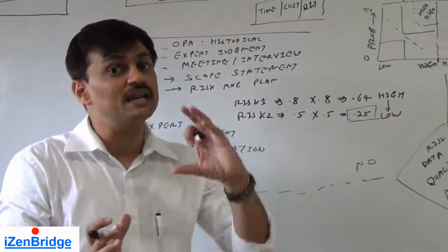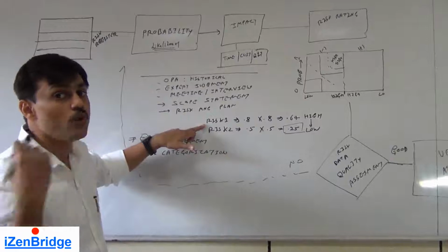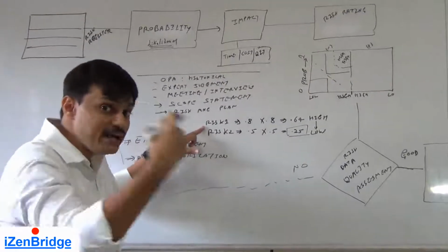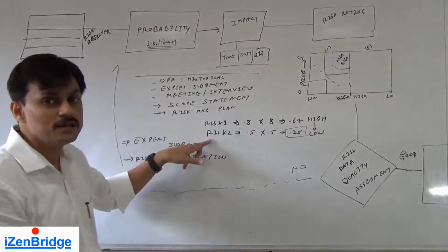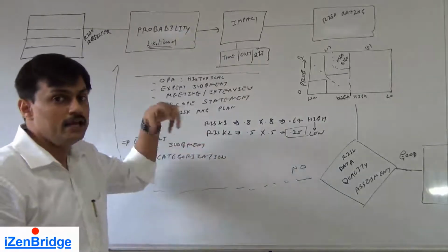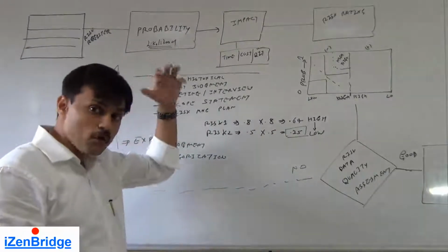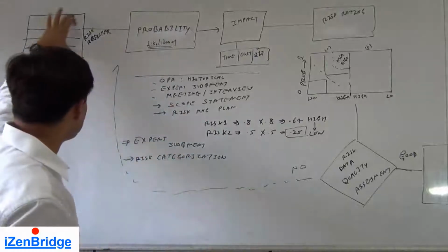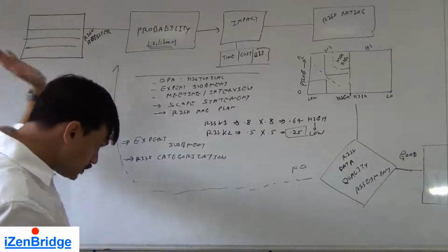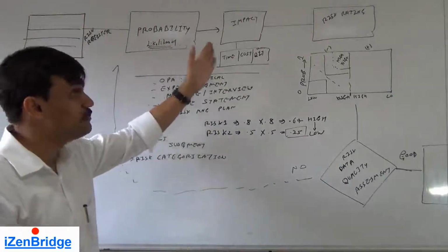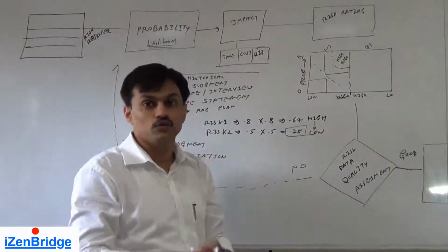We can categorize on the basis of possible causes. For example, risk 1 which was related to a vendor, we can say a vendor or third party impacted risk. Risk 2 which was more related to infrastructure availability, we can categorize as an infrastructure availability category risk. Sometimes a risk category may come from a risk breakdown structure. While identifying risk, we may already know some of the risk categories, but during this process, since we are doing more probability and impact analysis and giving it a ranking, we may identify new categories for the given risks.